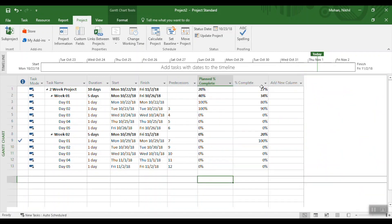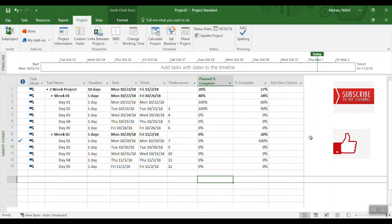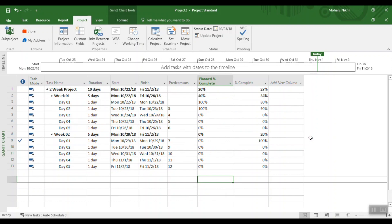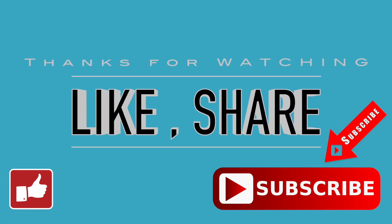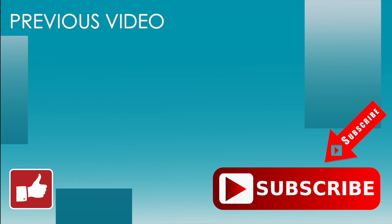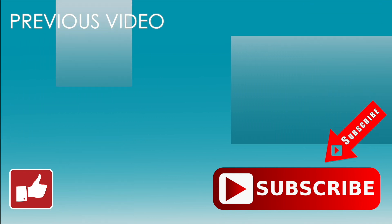At any point in time you can compare what the percentage complete should have been if you followed the plan dates against the actual percentage complete. I hope this helped — if you liked this video, give it a thumbs up and consider subscribing to the channel for more videos like this. Take care!